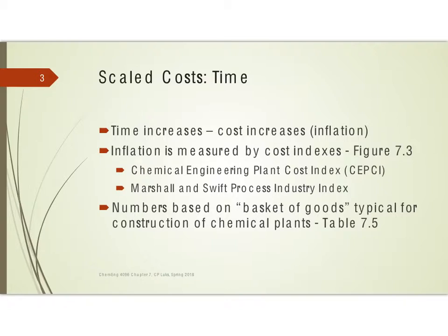The two that are most frequently used are the Chemical Engineering Plant Cost Index, which is the CEPCI, or the Marshall and Swift Process Industry Index. Each of these is going to be based on what's called a basket of goods that would be typical for construction in chemical plants, which is why we use these. If you're using this or wanting to apply this to a different industry, then you need to find the cost index that's appropriate for that material.